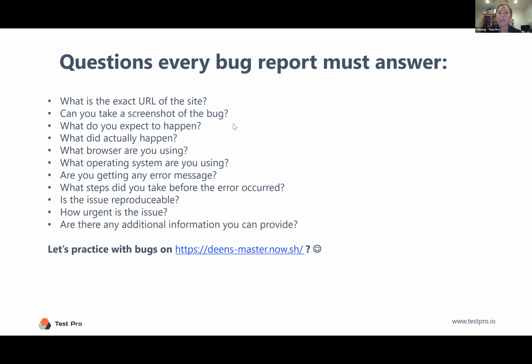And the reason why I say that is if you start combining 5 bugs into one ticket, that's not agile. That's not quick enough for the product owner to push it, to read it. You know, they have to do 5 different parts, so it can't be delivered back to you to test it. So one bug, one ticket, that's it. It makes it easier for the agile process to get fixed. If it's a small little bug, at least they can address it, fix it, and kick it back to you. When you start adding multiple things, that bug can never come back to you until maybe a few weeks later. So you want to make this as quick as possible.